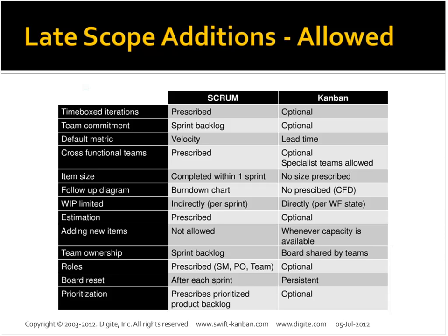You could always build a system where the customer is requesting, and you're working through the entire value stream, and if possible in a decent size card, you are just delivering it right then. So instead of a time box approach, it can also be a feature based flow. You could decide on a feature, implement it all through and deploy it. You don't have to wait for a particular time period to be able to deploy that feature.